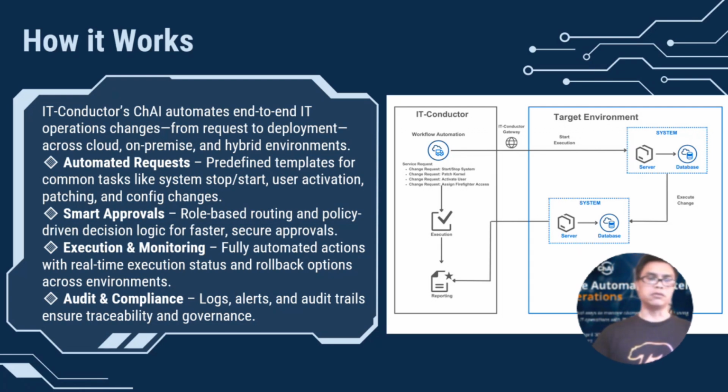And so next time you're requesting a similar change, you have a history, you have a compliance record, and it's easier for management to approve change when there's a history of, you know, if you're requesting 30 minutes, did the log show you took 30 minutes last time, maybe you took longer. So this type of thing is important for a change review board.